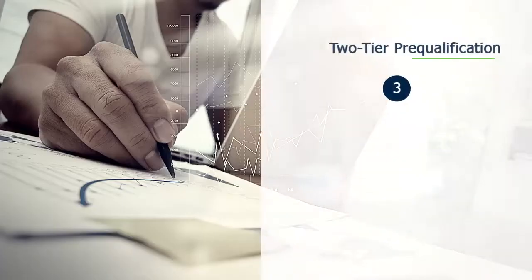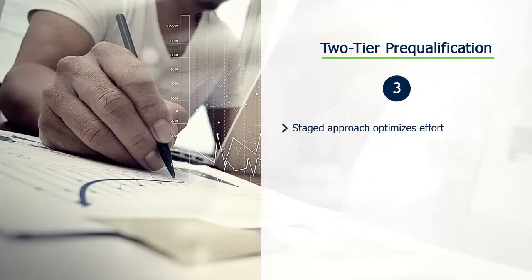3. Use a two-stage pre-qualification process where practical. A two-stage qualification process is a tiered approach that includes general screening and statement of work screening. General screening ensures essential due diligence and determines if the contractor is qualified to move to the next stage. Capacity, capability, safety performance and programs, and the adequacy of insurance coverage are key subject matter areas.